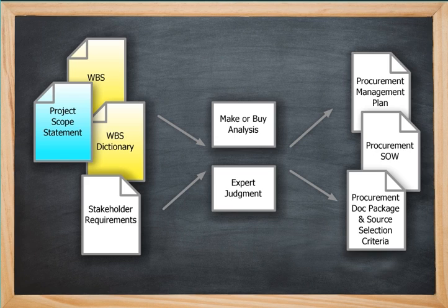The first is the Procurement Management Plan. This provides guidance for procurements as contracts, standard terms used, and if the procurement is shared with other projects. That is especially important for software companies, where some technology may be used on more than one product line. It also includes rules for handling suppliers, constraints, assumptions, and schedules.